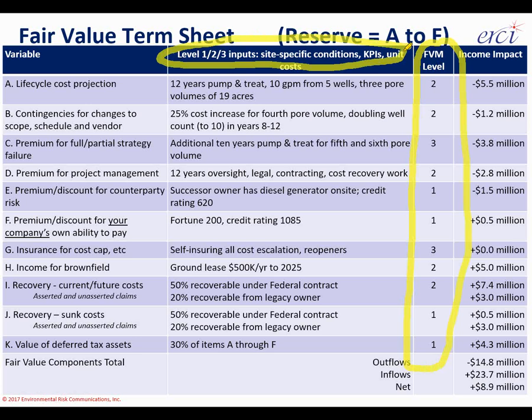Starting with the life cycle cost projection, explicitly state: we expect 12 years of groundwater pump-and-treat, pumping 10 gallons per minute from five groundwater extraction wells, pumping out three pore volumes of a 19-acre space. We also include contingencies for changes to scope, schedule, and vendor — in this case, a 25% cost increase for pulling out a fourth pore volume and doubling the well count in years 8 to 10 from five to ten wells. Other items in a fair value term sheet include premiums for full and partial strategies, a premium for internal project management, and a premium or discount for counterparty risk, offset by your company's own ability to pay.